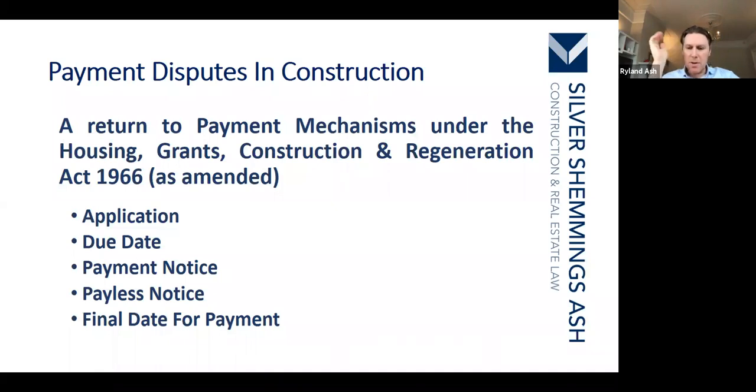Now, with the Payless Notice, you can effectively revalue the whole lot because of the way that the Construction Act is drafted. So effectively, payers, employers, and main contractors have 2 bites at the cherry, really, to value the works. You can value them at the payment notice, or if you miss that, or you want to change your mind again, then you issue your Payless Notice. And then you can go back to basics in relation to that notice. So that's very much in favour, if you like, of the payer. And then the final date for payment, well, that's the date by which the party to receive money should get it in their bank.